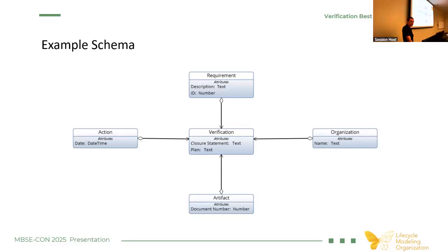So starting in the top middle of the slide, we have our requirements class. And one of the ground rules that we have implemented is every single requirement will have one or more verifications. The reason why we did this is because it's a byproduct of the requirement sets that we were originally provided. Because NASA maintains that architectural requirement set's authority, we didn't really have to refine or break down requirements in any way. So the major thing that we had to do was how do we verify all of them?